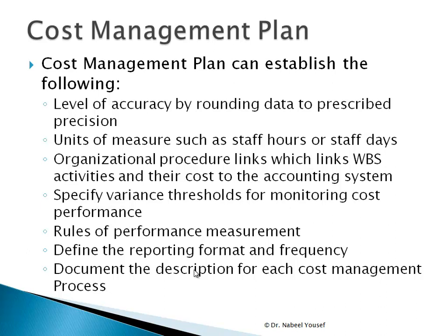Then we identify the different units of measure that we are going to use for the project, whether staff hours, staff days, or maybe dollar amounts. It depends on the organization policy or the project manager policy, but in the end it has to be a certain unit that is unified through the whole project. And then of course the organizational procedures, which link the work breakdown structure activity and their cost to the accounting system.